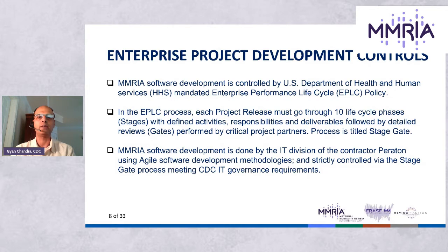Each project release must go through pre-designated phases or stages, which consist of activities, responsibilities, and deliverables that are considered best practices for HHS. After each stage, there is a review or gate, which is performed by critical project partners who utilize their subject matter expertise to ensure compliance with applicable policies and procedures. This strictly controlled stage gate process ensures overall project compliance with CDC IT governance standards and complete oversight of the entire process.